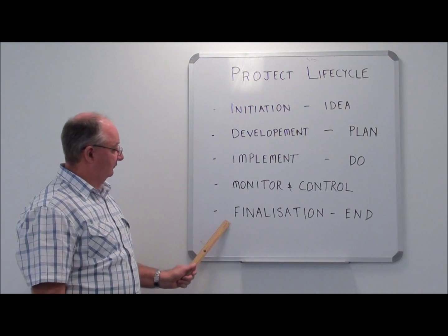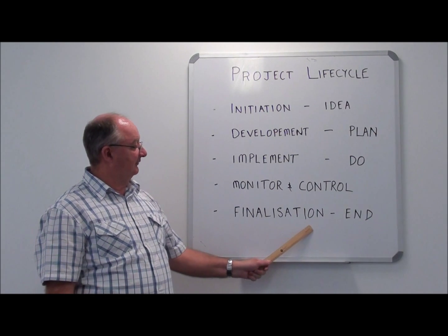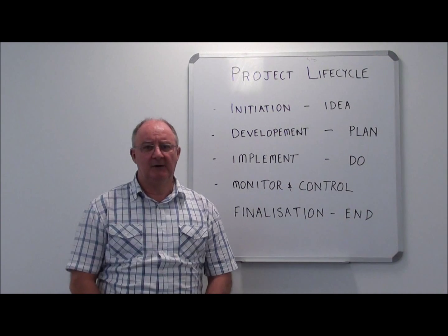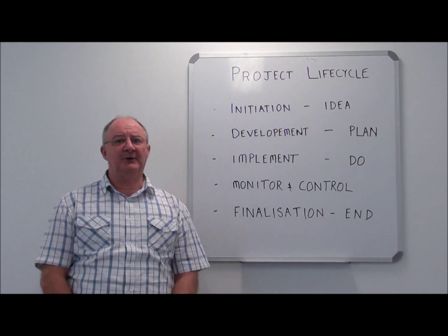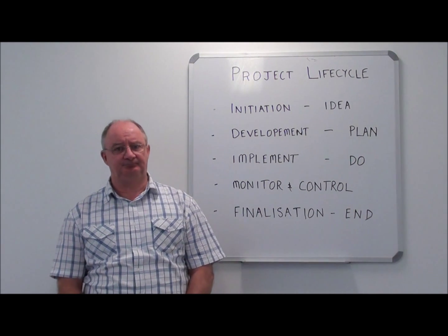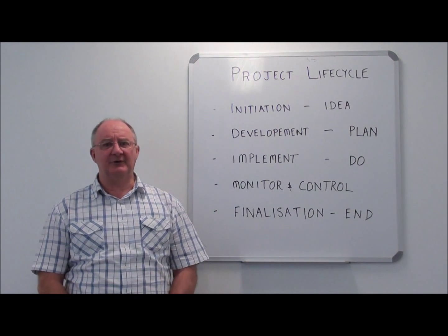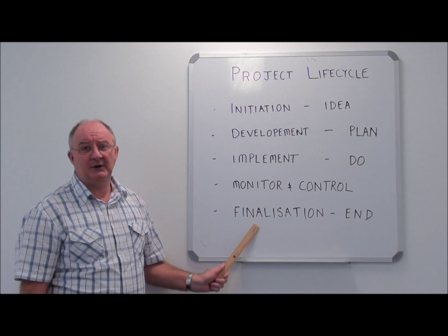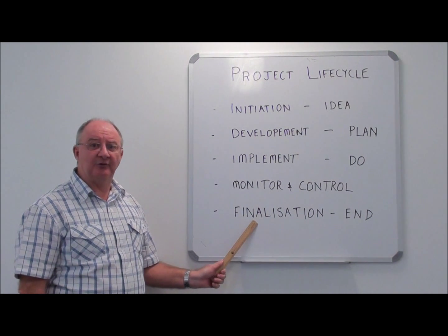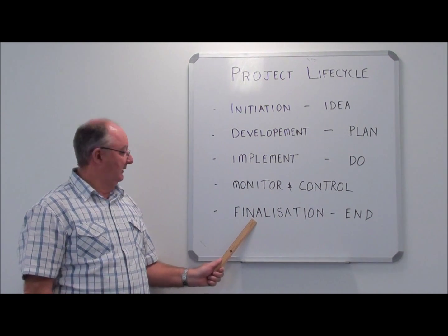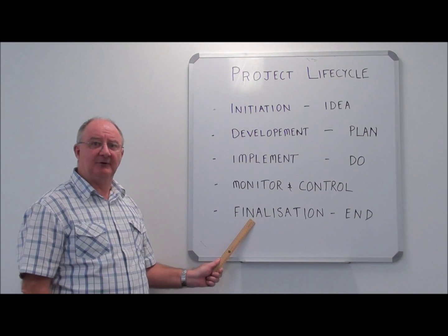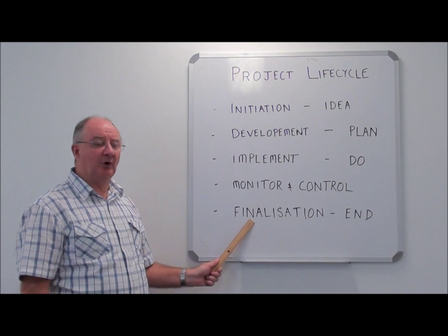Our final phase is finalisation. That is actually the end of our project. The project isn't completed when the item is handed over. There is a significant amount of work to be done at this point. You have to make sure all the invoices are in for your funding. You have to make sure someone signs off to accept the item that we have got.